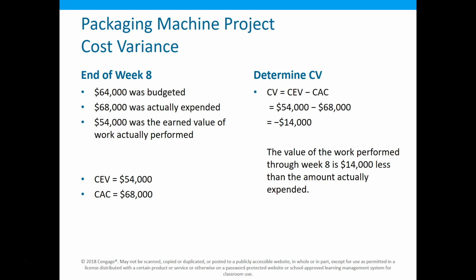Well, crud. This one's probably one of the easier ones because we can just subtract. We have to make sure we're subtracting the right numbers, and the most common thing people will do is subtract the budgeted cost out of here, not the actual cost. So, cost variance.